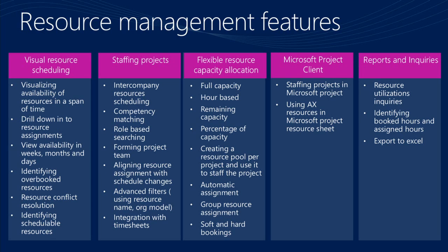We also have introduced the concept of hour-based assignment. What if I want this resource, but just 10 hours of him, or 50 hours of him? We also introduced percentage of capacity, which we found very, very common in IT consulting. People work on different projects on different capacity, 50% here, 10% here. We have enabled that.